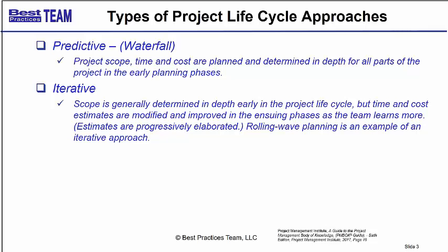Our WBS for the kitchen, we're going to go down pretty deep into that WBS, down to level 5, maybe even deeper for all the kitchen remodeling. Then for the second priority, the upstairs master bath, at the beginning of the project, we'll just sketch in at a high level the first levels of the WBS, maybe level 1, level 2, level 3 perhaps, of the upstairs master bath. We're not going to do the upstairs master bath for another 6 months, so we can wait to put in more details. We'll wait for about 4 months, 4.5 months, to start filling in more details in the WBS for the upstairs master bath.